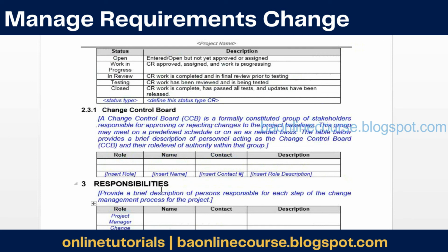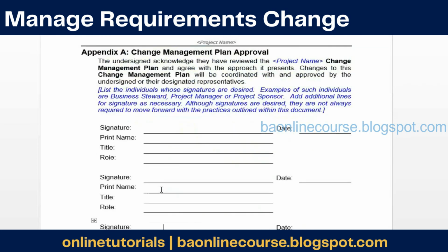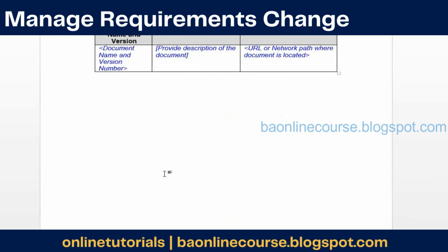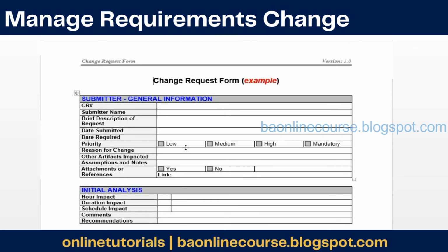So you are not preparing this document. The project manager owns this, right? Sometimes he could ask you to do that. It all depends from project to project, but it's not too complicated. You need to figure out who those people are and then fill it. Then both the client and the vendor project managers would sign off this document, saying that we'll follow this change management plan. Okay. Then I think you have a template also here for the change management plan.